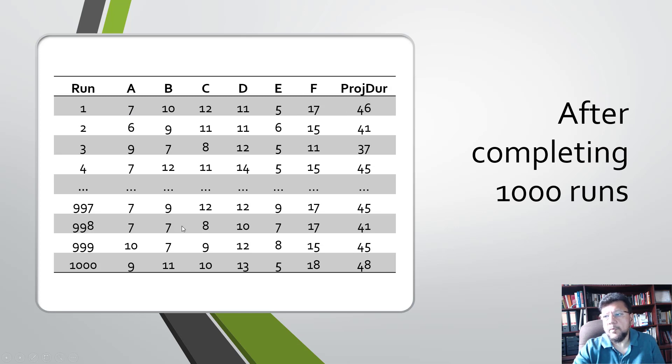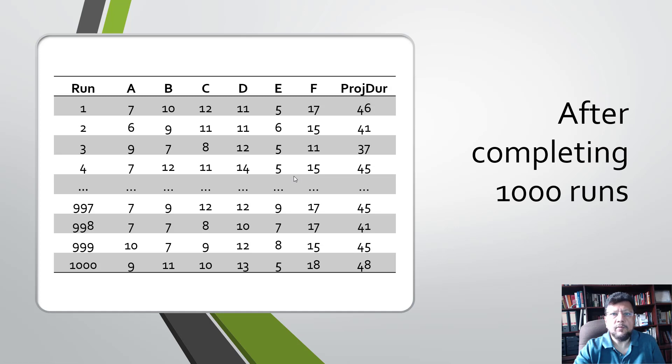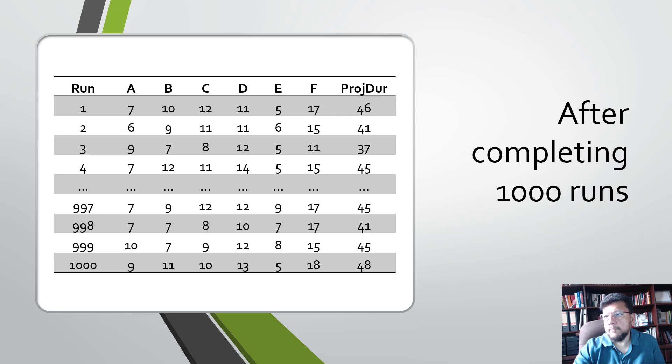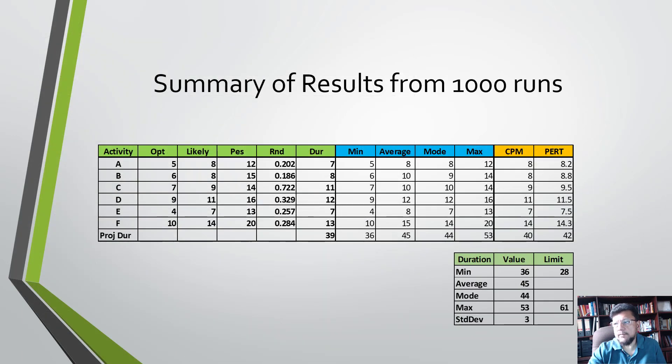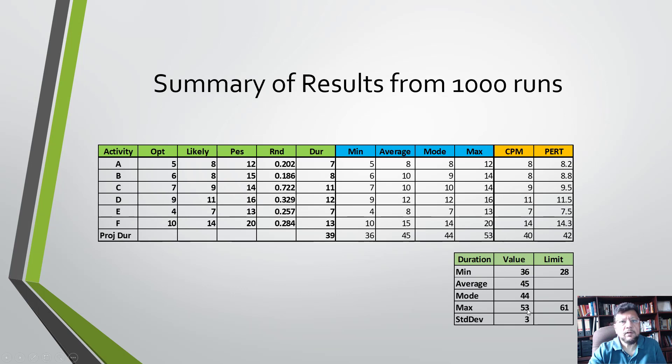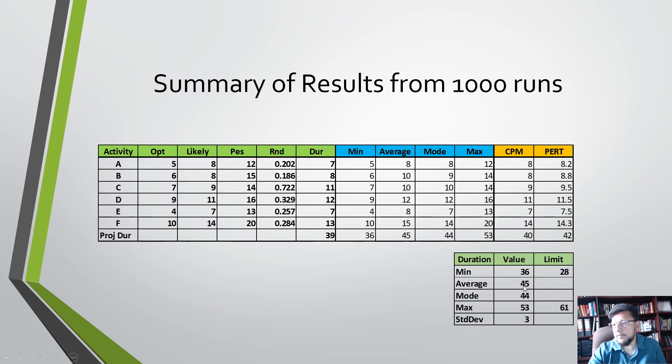For each run, what we're looking at is what is the total project duration that we got during this run. If you look at the summary of results after this analysis, we see that the minimum in this 1000 runs was 36 days. The average is 45, the mode, which means the most frequently seen duration, is 44 days.